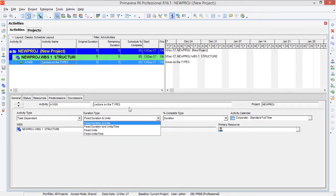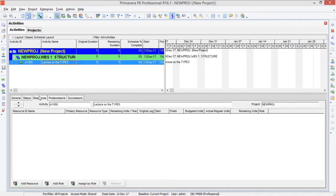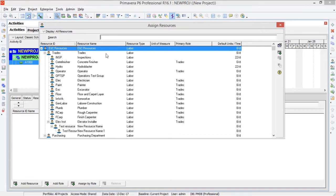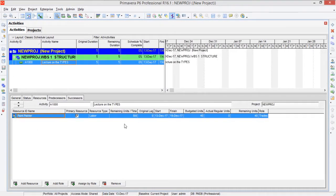We have defined an activity with a default duration of five days. First we have to assign a resource to our activity. For that we come to the resource tab and from here add a resource. You are shown a resource sheet where you can assign any predefined resource to your activity. Let me assign this 'plant' resource — note that its default units per time is 8 hours per day. Click on assign, close the window, and you can see that your resource has been assigned.